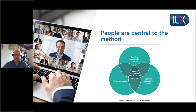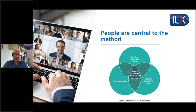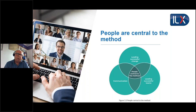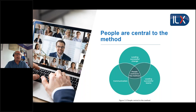Leading successful teams looks at how we lead teams and achieve collaboration and cooperation. Leading successful change is particularly significant. In the past, PRINCE2 talked about handing over outputs to business-as-usual at the end of the project, and those operations would generate the benefits - but that doesn't always happen. You might have delivered to time, cost and quality, but if you haven't engaged effectively with stakeholders, they may reject what's delivered. The focus now is on getting people to say yes to the change and buy into it.